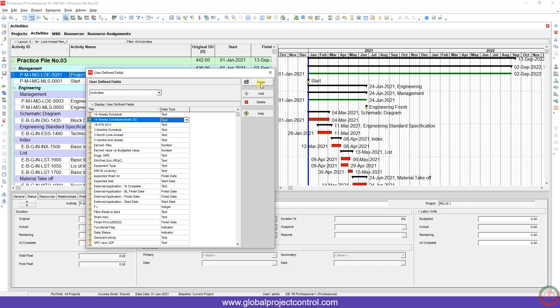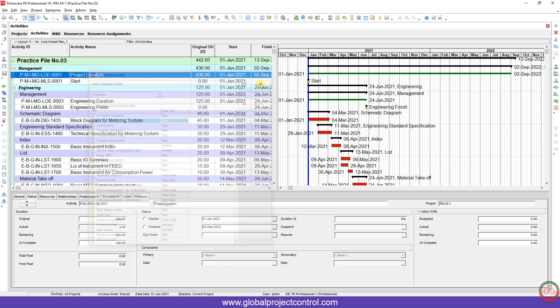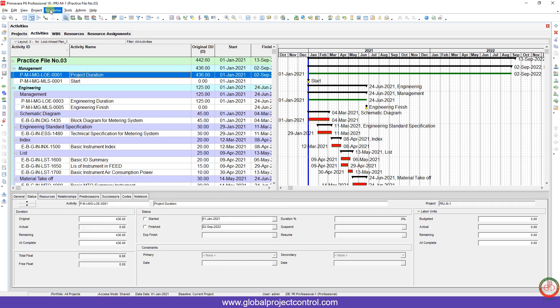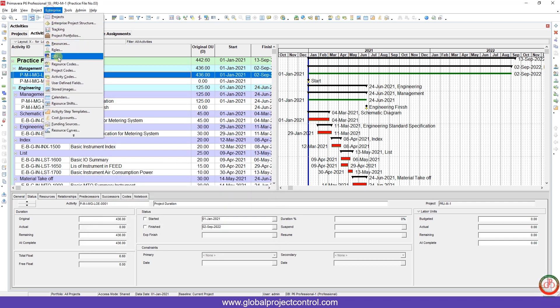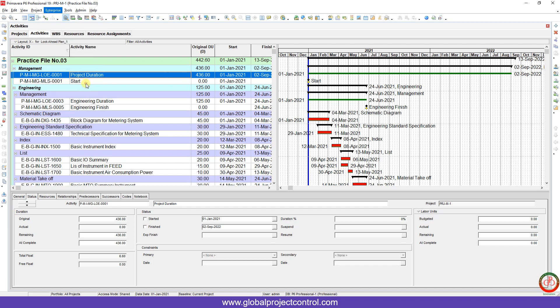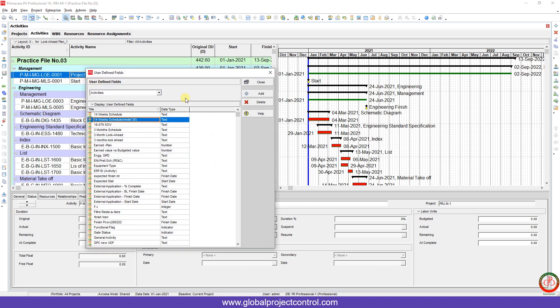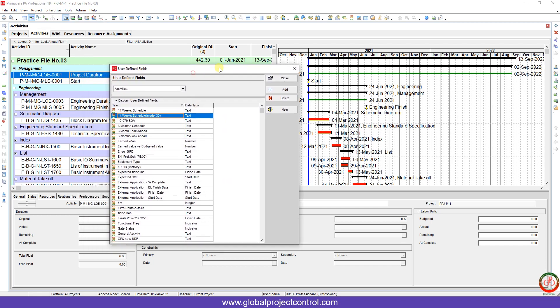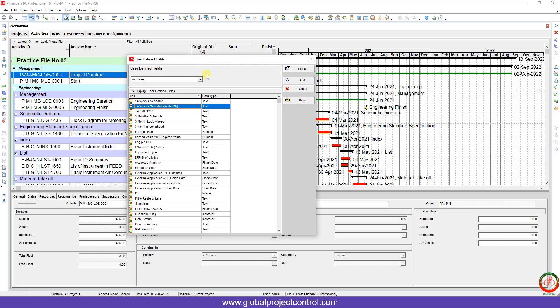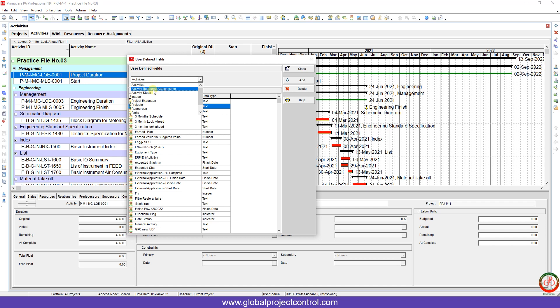If I close this dialog box and go to the Enterprise menu, you have the user-defined field here. After I click it, this dialog box pops up and I can select. I want to create a user-defined field from activities, resource assignment, or other fields.